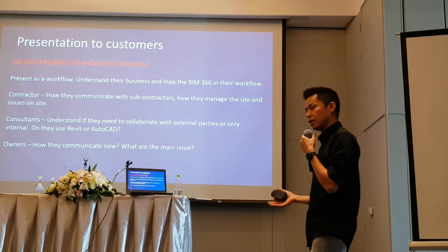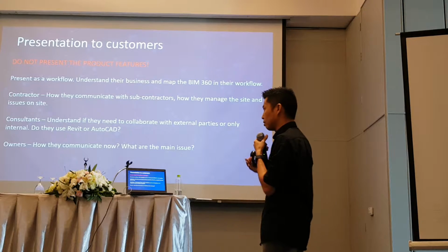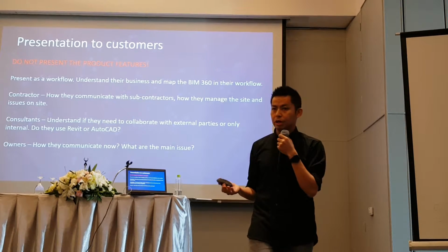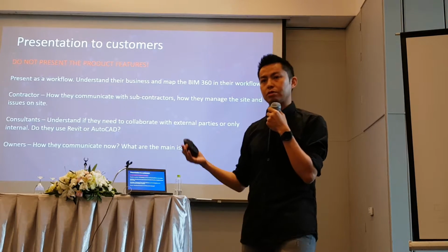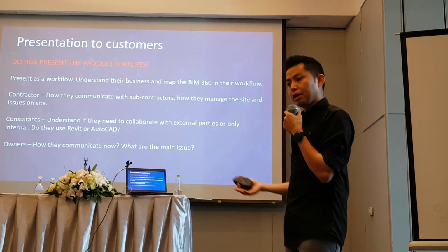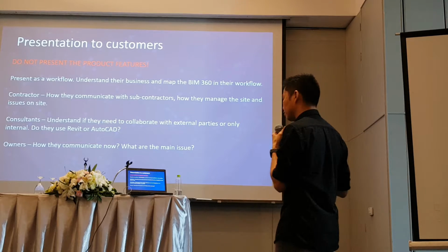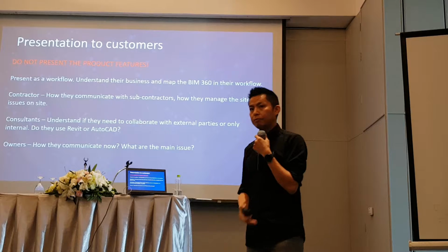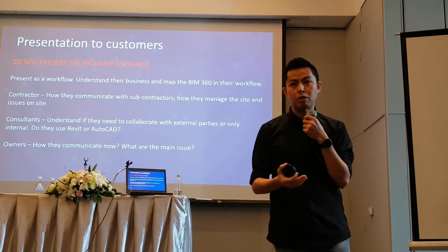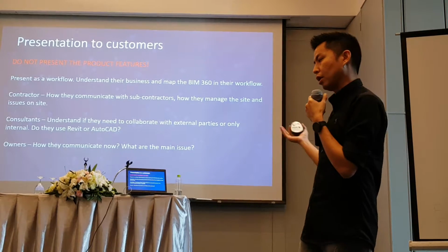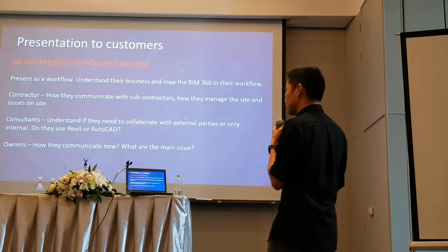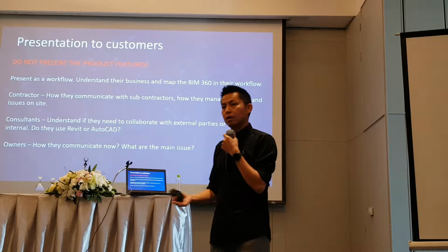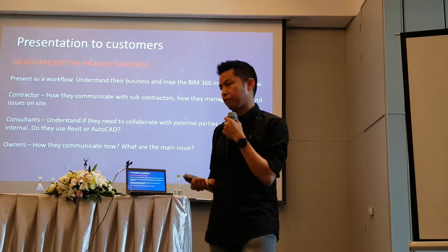Look, previously people don't read emails and people get frustrated because they cannot find the emails. People are not responding, but look, with our RFIs, we have a workflow, we have a due date, we have an attention, we have a reviewer, we have a checklist and so on. This is where you can keep track. Normally the contractor has a site meeting with the subcon. You can pull out the report in our BIM 360, monitor it, and use our report for the discussion in the site meeting. So you blend our BIM 360 into their workflow.